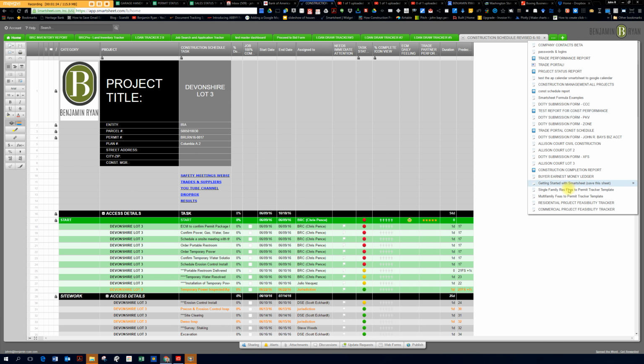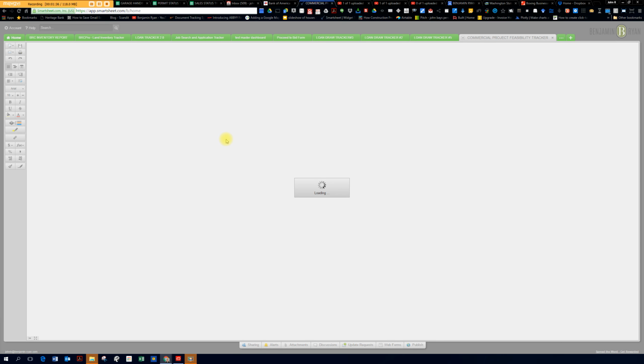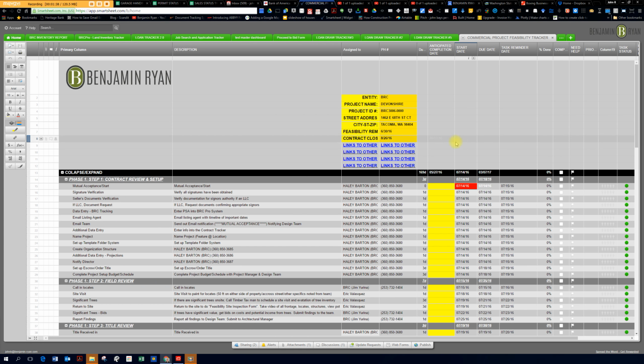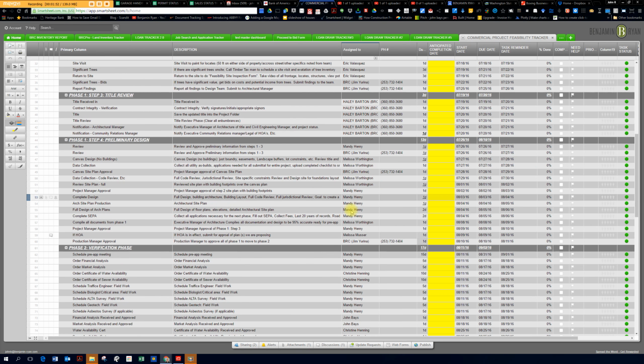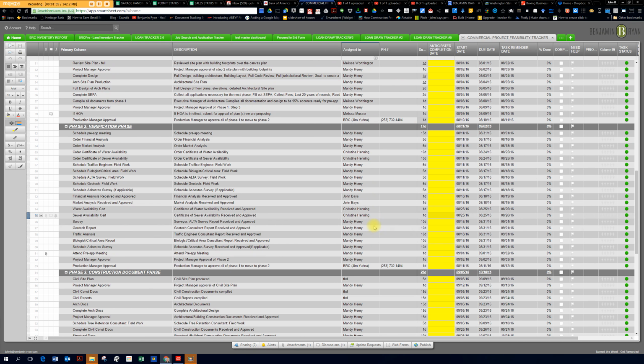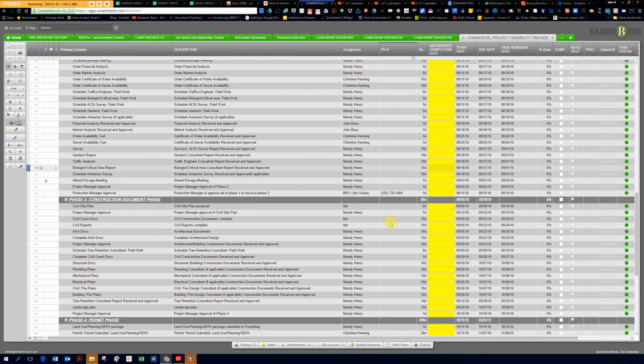Oh, sorry, that's the construction management schedule, the commercial schedule, and we're looking at closer to about 8 months. 8.5 to 9 months is the standard timeline. So 60-day feasibility. Want to see a 180-day close with a permit in hand in 9 months. So no reason why that can't happen fairly quickly.